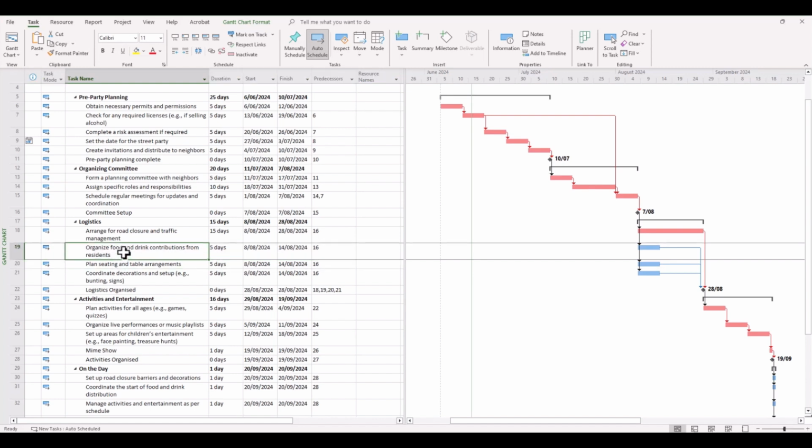A useful function is the inactivate function. And what you can simply do is click inactivate, and you'll notice it's not completely removed from the visuals, but it is actually removed with regards to the resource and the time frame. For example, I've just chosen a task that doesn't sit on the critical path, so generally nothing has changed in the overall time frame apart from the actual task.